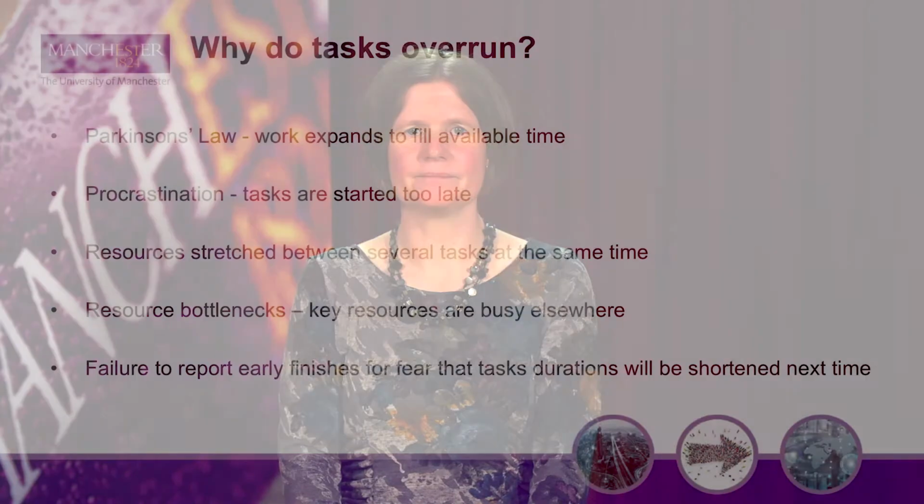their commitments. So, for example, they will give a task duration with a close to 100% probability that it will be achieved. What we are effectively doing here, of course, is introducing a buffer into our task. And if we apply this 100% probability to each task duration, then in theory we should finish all projects on time. But the reality is that we don't, due to a number of reasons.